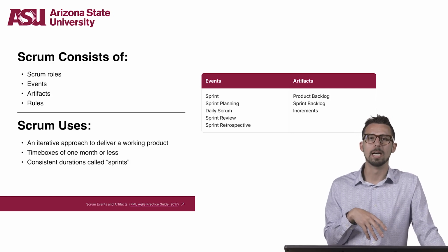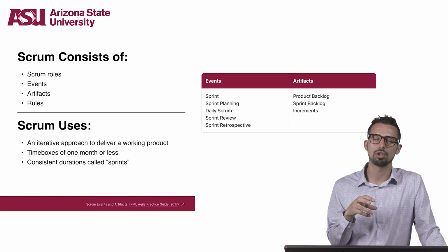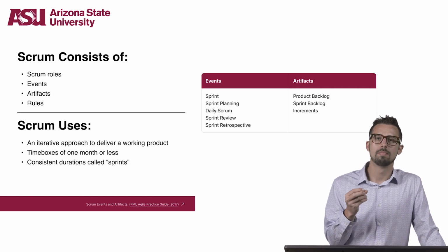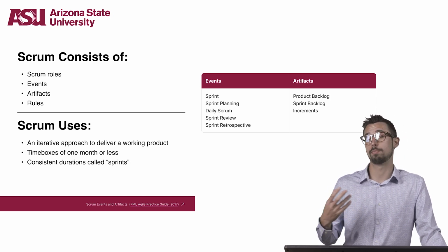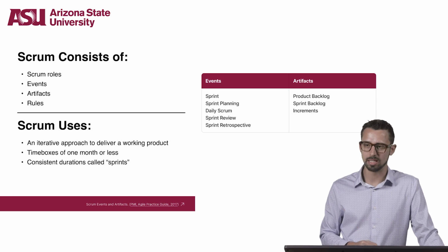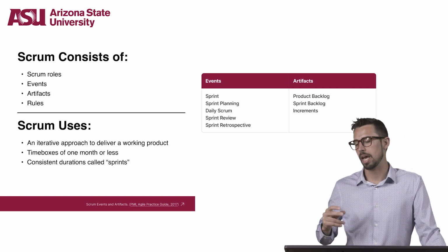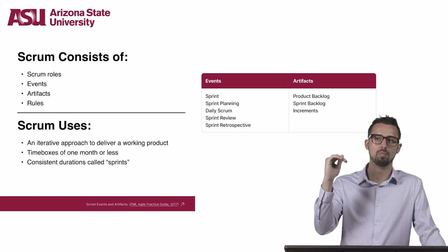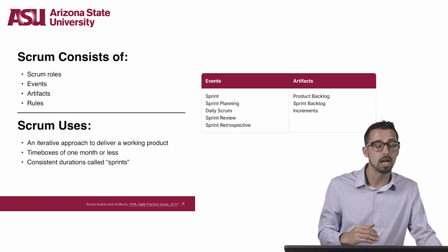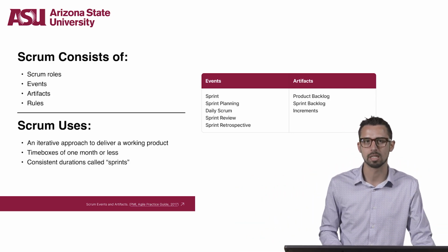Now, those sprints are where a potentially releasable increment of product is produced. So if you're working on a design team, let's say that you are working on a website, and within that one iteration, maybe you were able to get 1 page designed. So it's not necessarily focused on the whole product. It's focusing on chunks of a product.